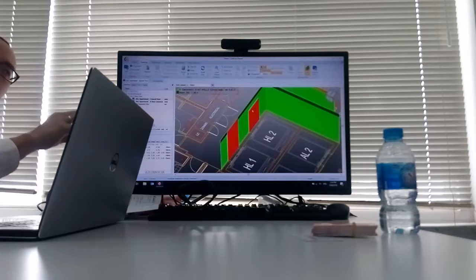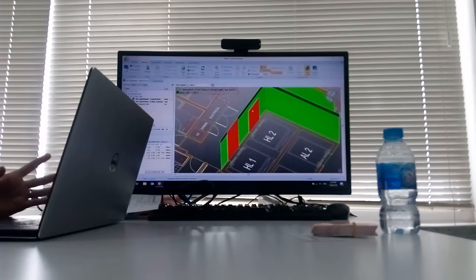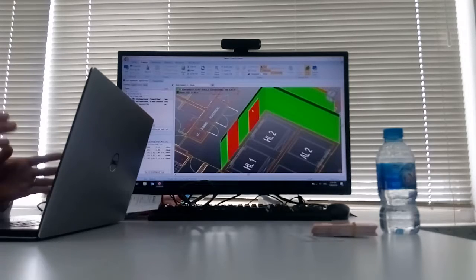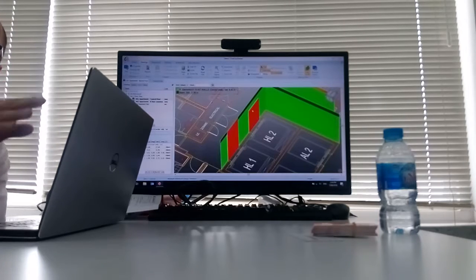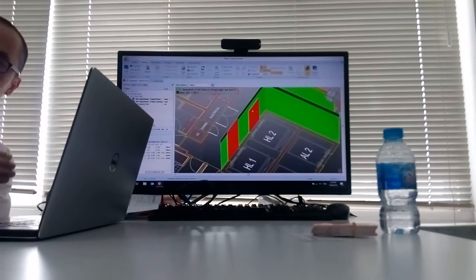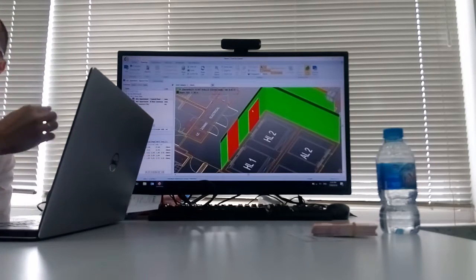The other benefit over here is that the door and window schedule is normally received separately. So you can do all the masonry in the layout drawing and do the deduction in the other drawing. In CostX, you do not necessarily need a positive quantity in order to deduct. You can have all negative quantity over here.